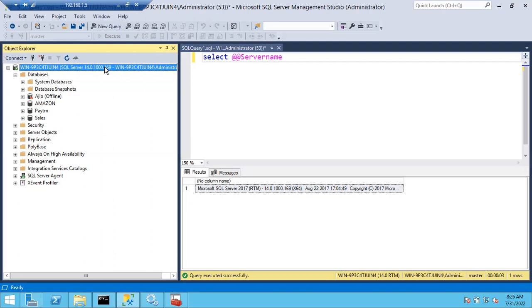Right. So it's very important. They will ask you the process also. If you explain, for one patching question itself, you can explain 10 to 15 minutes with the process. First, I'll check with the customer and send an email for the downtime. Once I get the approval from the customer, I'll raise a change request. Once the change request is raised, I'll present it in the CAB meeting. Once CAB approves that change, then I'll proceed with the patching and all. If you explain with the process, he will be impressed, guys.